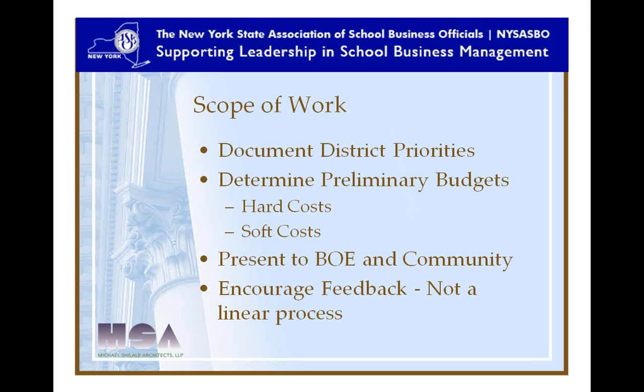Most of the time we consider that a hard construction cost. But site work is also included in the soft or incidental costs submitted to SED, and they try to limit those to about 22% of the budget. So you want to analyze that and make sure you're all within what you think is going to pass muster in your community, and you present that to the Board of Education and the community. We recommend an